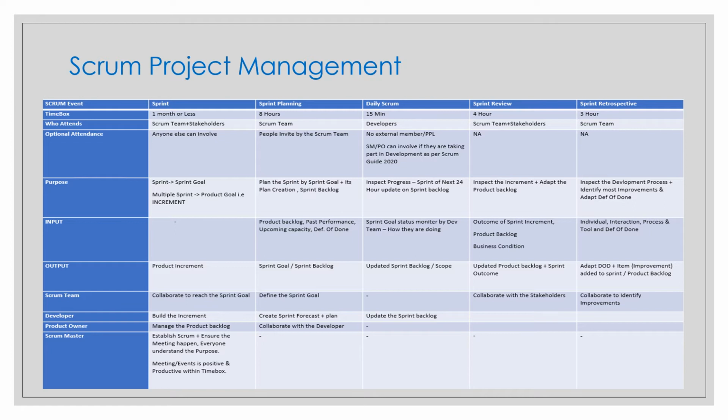Typically, an item will have attributes. Your PBIs have attributes like description, order, size, and value. Product backlog items often include acceptance criteria that will help test if the work performed is complete. The sole person accountable for the product backlog is the product owner. We call the activity of making changes to the product backlog management.